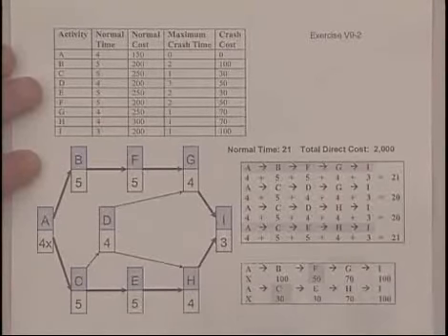So, even though it's a little more complicated, the same principles apply. We identify the critical path like we did, and then choose the cheapest activities along the critical path to shorten the duration of the project. And so what I've done is again listed the two critical paths and recorded the crash cost for each of the activities, putting the X under A since we can't crash that. And we look at this, we have the opportunity to crash just one activity, I, and influence both paths, like we did in the earlier problem.